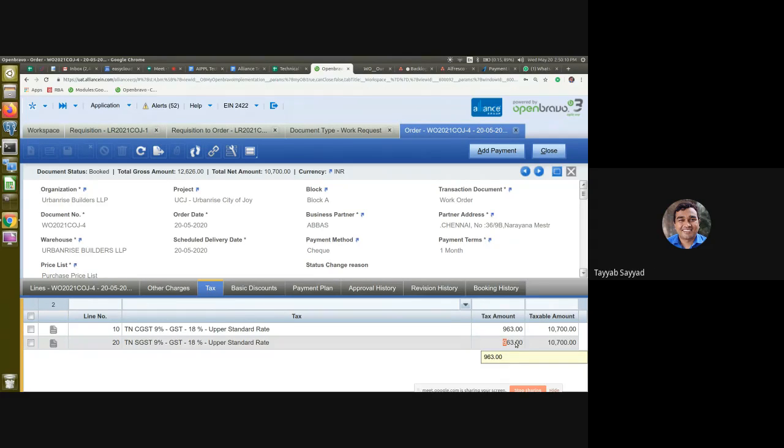In the terms and conditions, there is no purchase here, now only the work order. So basically at the time of billing, they will deduct the needed tax rate. The account team will deduct the TDS as per their norms. No, because before releasing the order, while issuing the order itself, we should tell them we are deducting this much percentage, for example, services under 10% TDS.